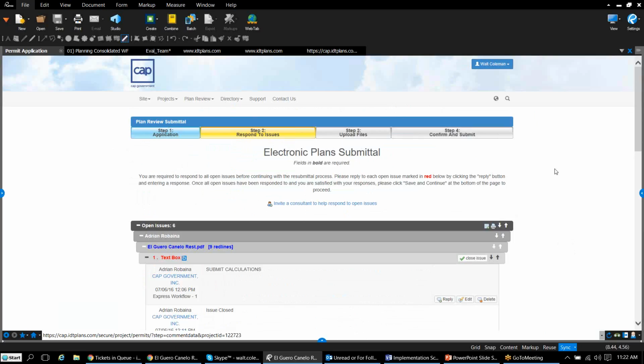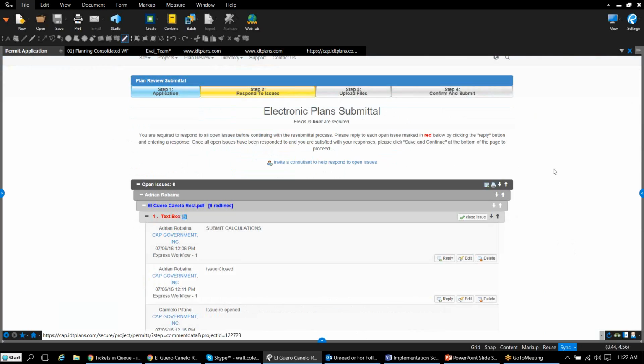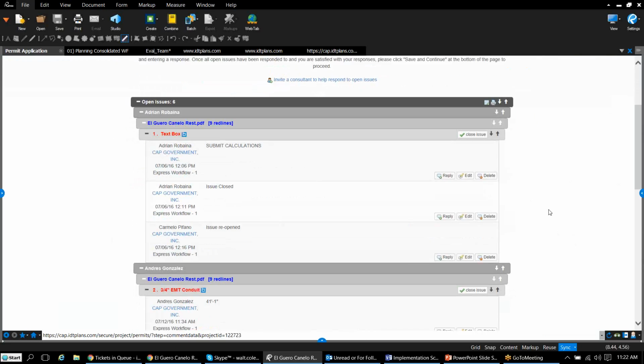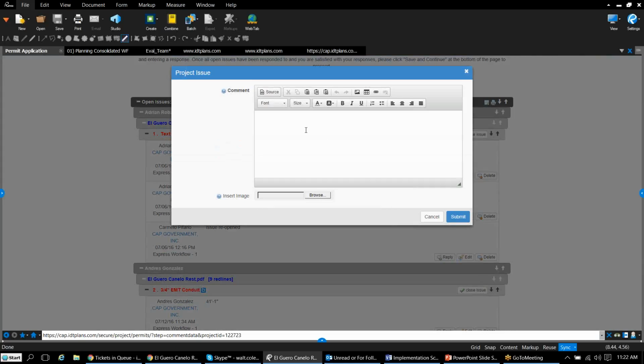So while the review team is doing other work, the applicant has got his list of requirements here, and he's required to answer each and every one of these open issues before he can move to the next page. So we're going to reply. We're going to go down through here, and I'm going to make some replies. So a likely reply to submit calculations, I'll say submitted with resubmitted documents.